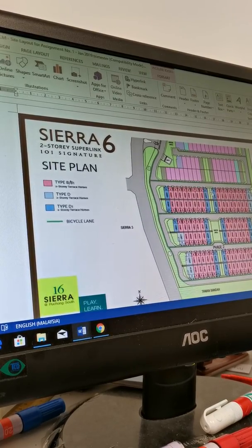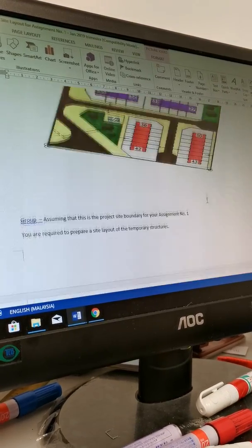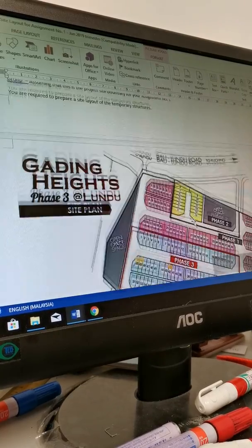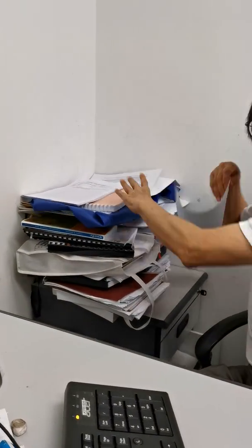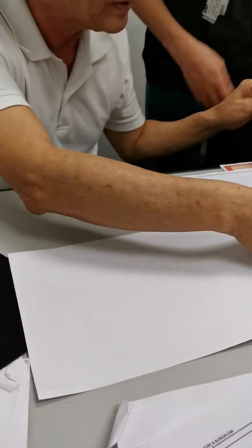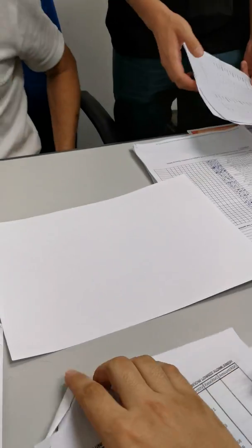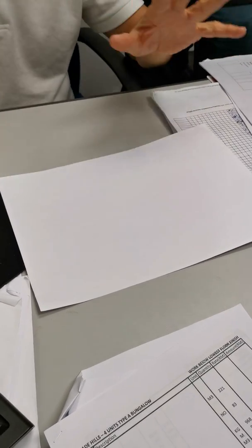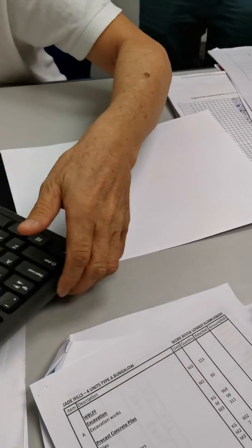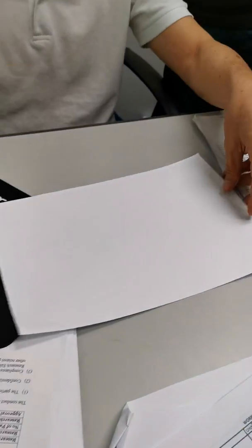Okay. If you really want to make your planning very sophisticated, the method is this. As I say, a good planner will always plan finish-start, because this is the easiest way to explain to professionals, to the judges who all don't know construction. Okay? If you use all these very funny types of start-finish leads and lags, they get very blur. So how to do it?